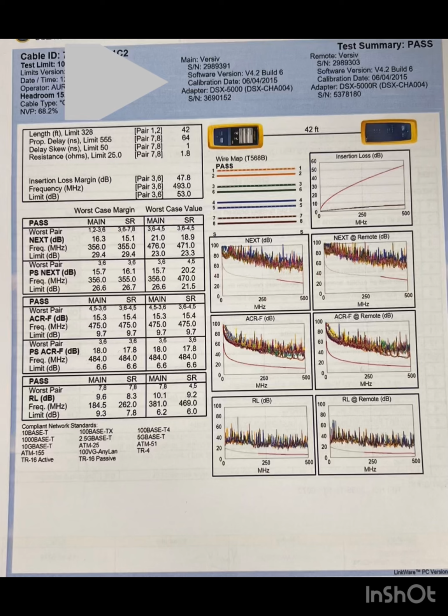It will be included in our dossiers, and everything must be signed: RFI, ITR, and during the mechanical completion or RFC walkdowns, everything must be clear. For the categorization of your punch list, Category A, if there is any, should be closed prior to the RFC walkdown. So right, everything is clear.